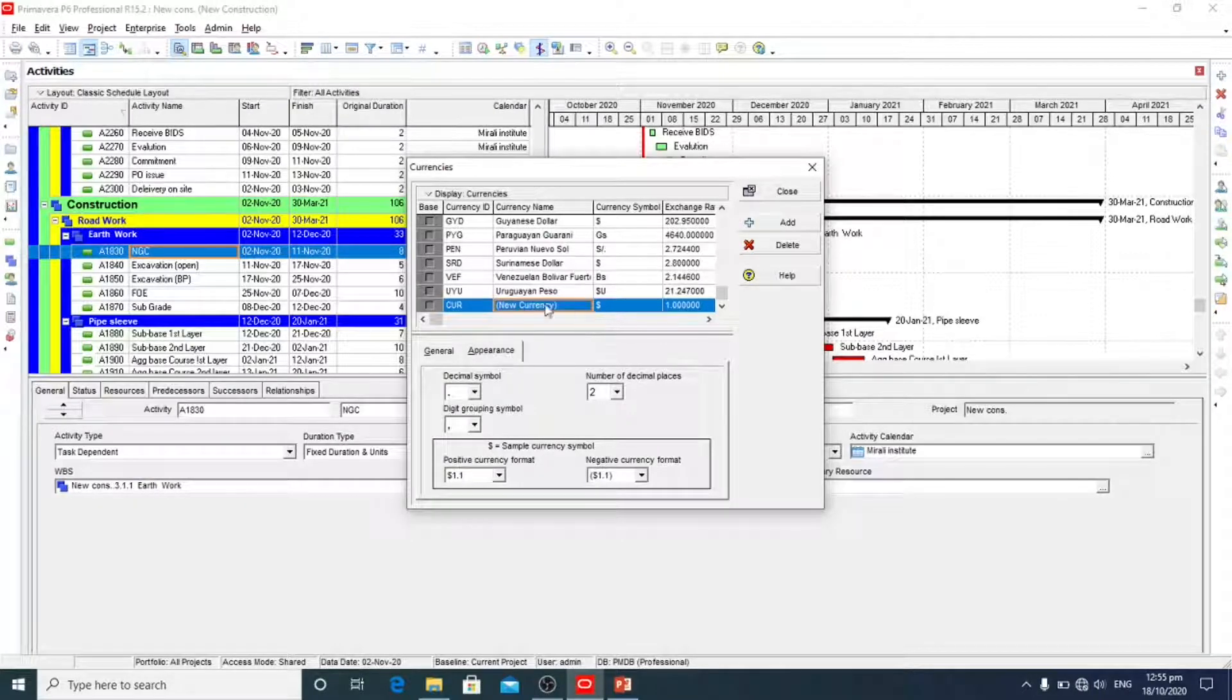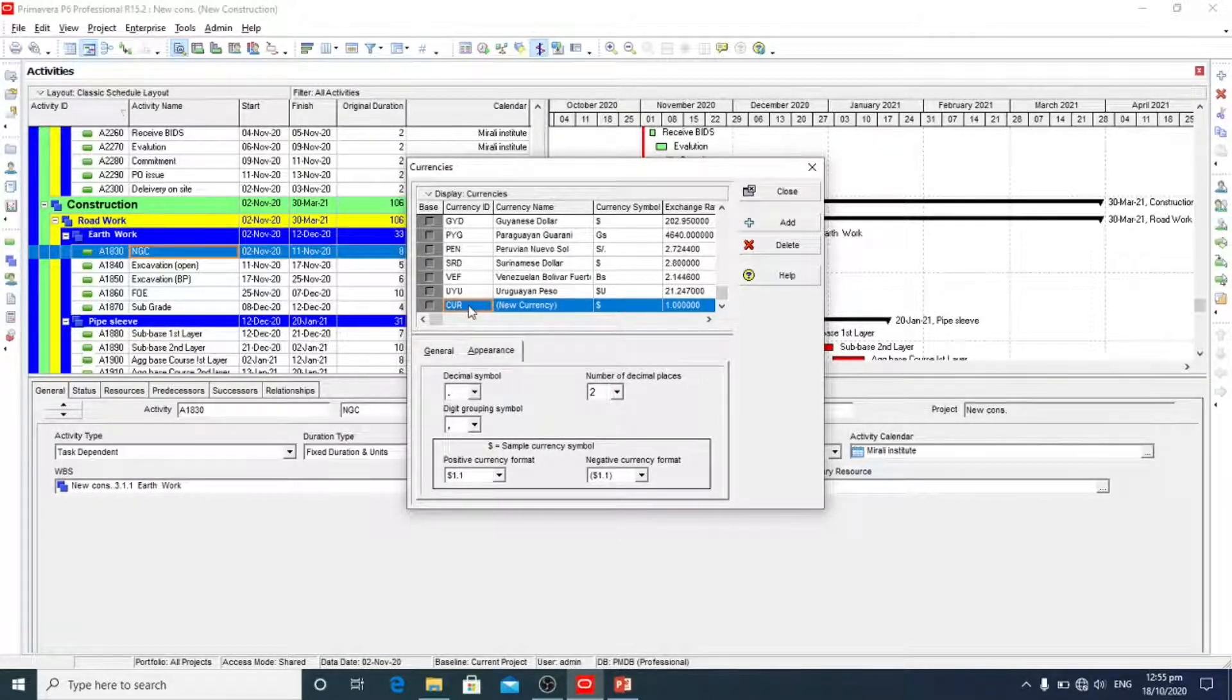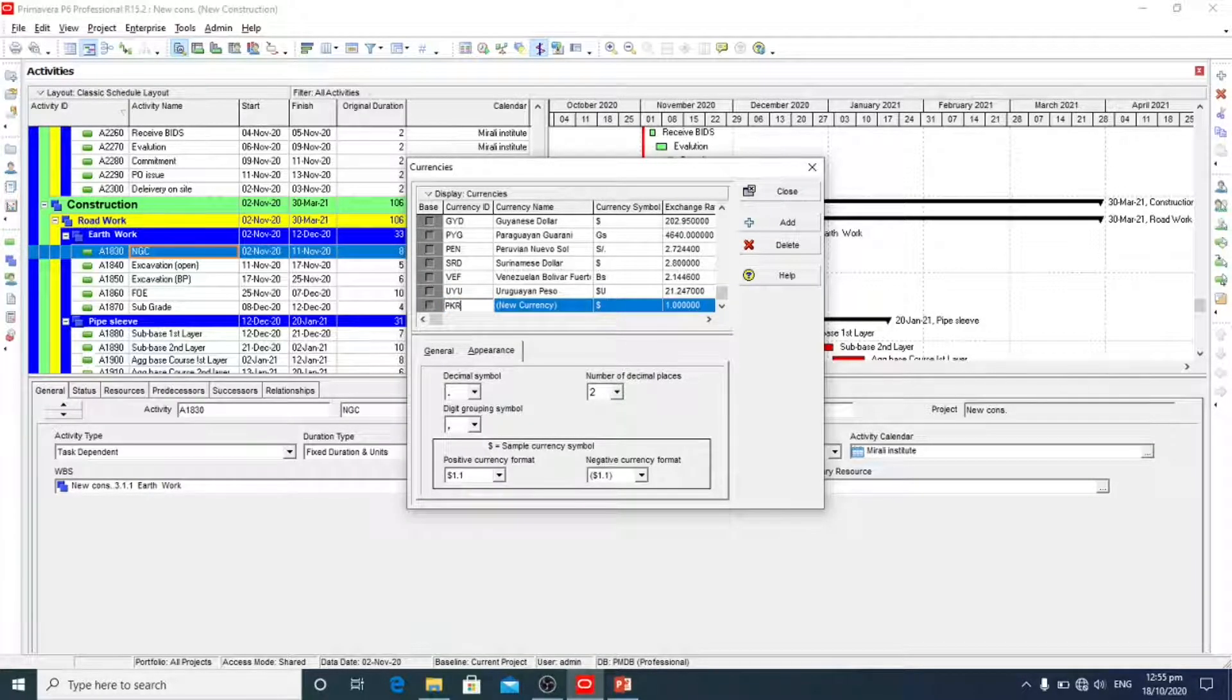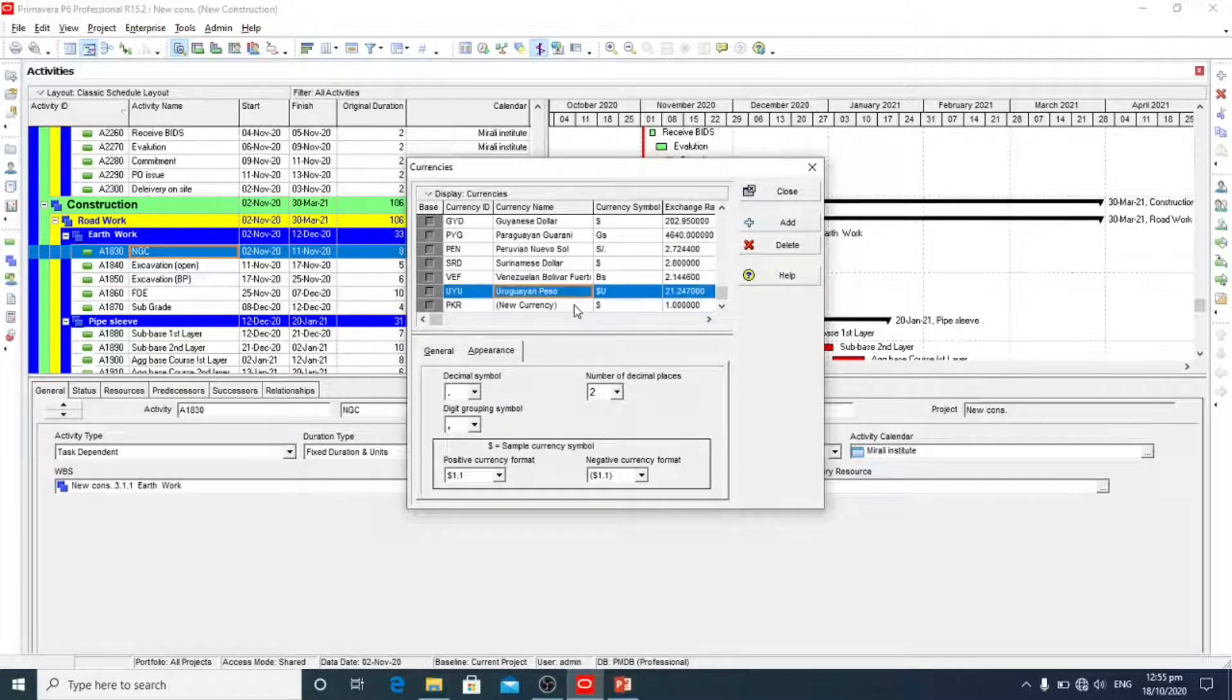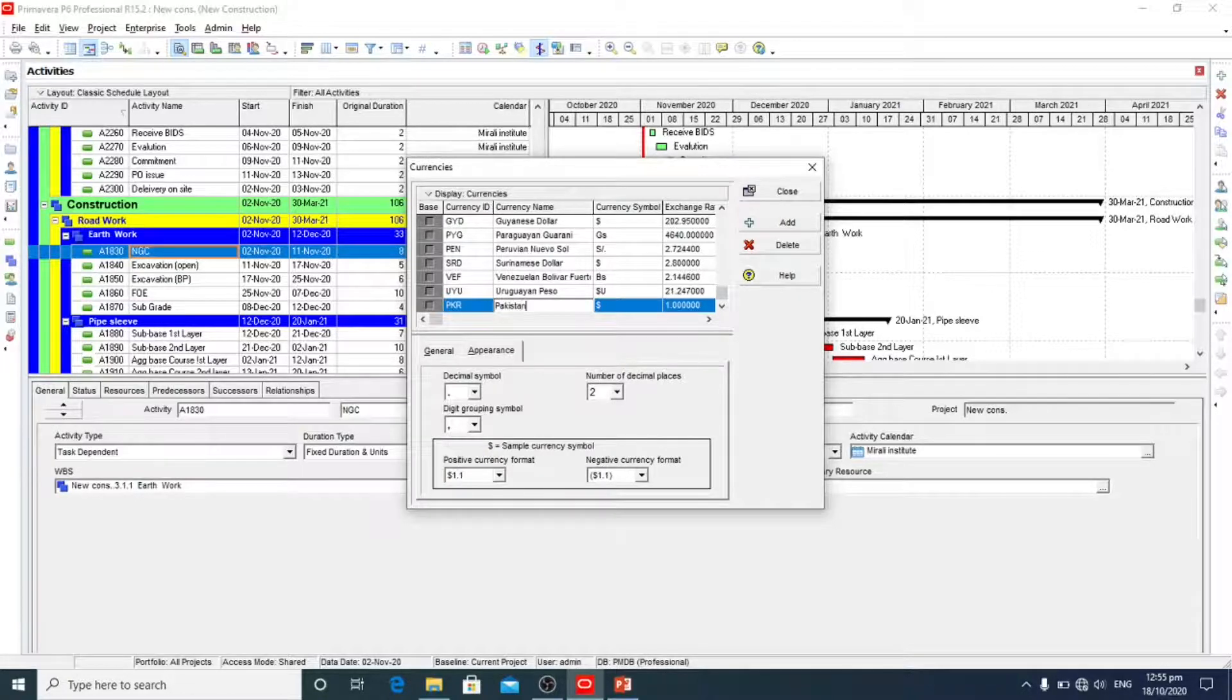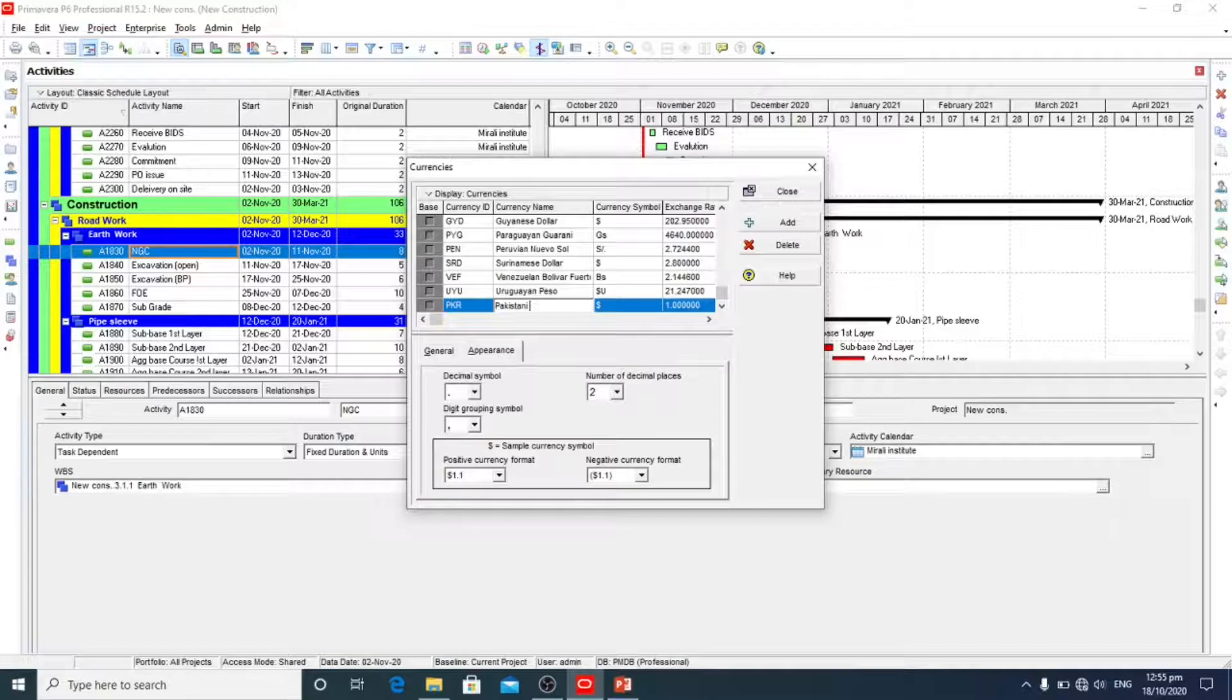We are going to add Pakistani currency. So for this, currency ID is PKR, currency name Pakistani rupees.